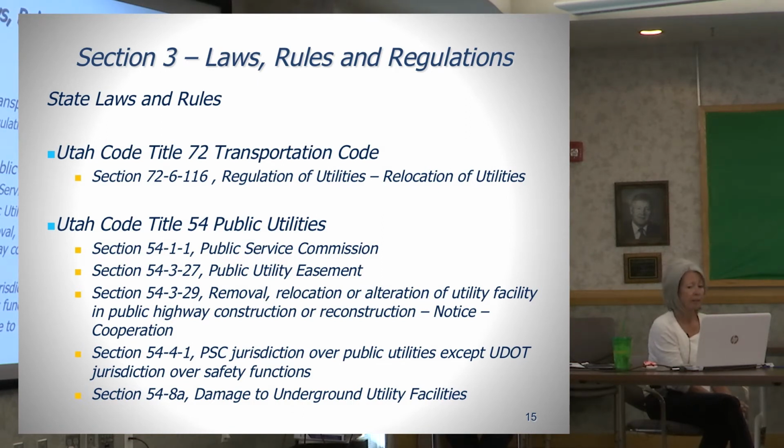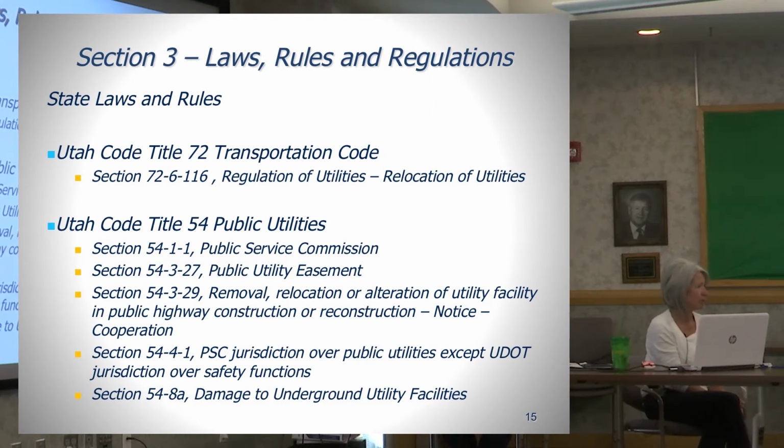There were a couple of changes in different laws about public utility easements. For 100% reimbursement, utilities located in public utility easements have been added to the law as 100% reimbursable.